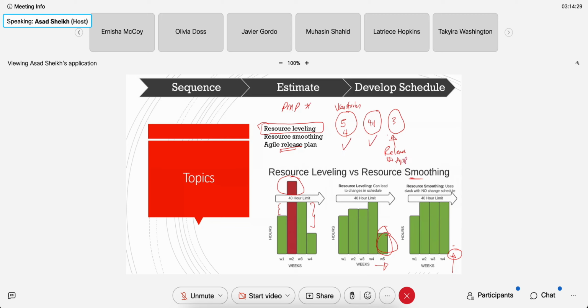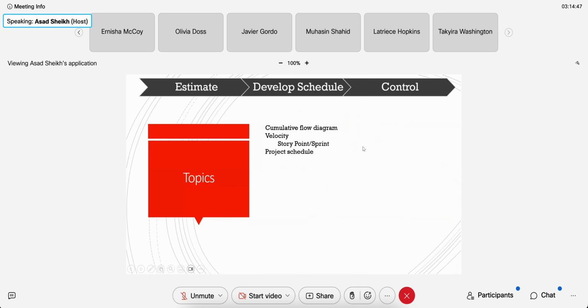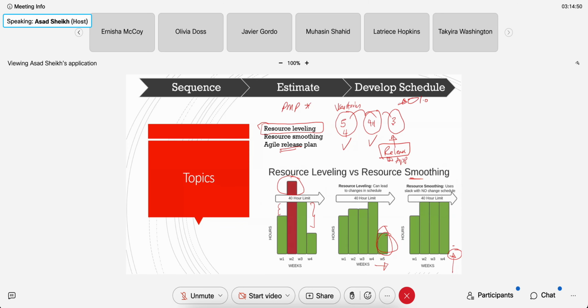You did not release it to the customer until you finished number 3, and then you released it, with the deliverables from all of them, and now you have release 1.0 of whatever. So there is no leveling. It's just that if you're falling behind, the one that you did not accomplish, you accomplish in the next sprint. You added that in to this one.